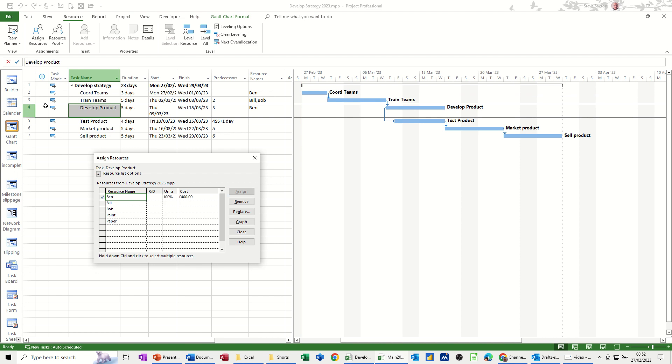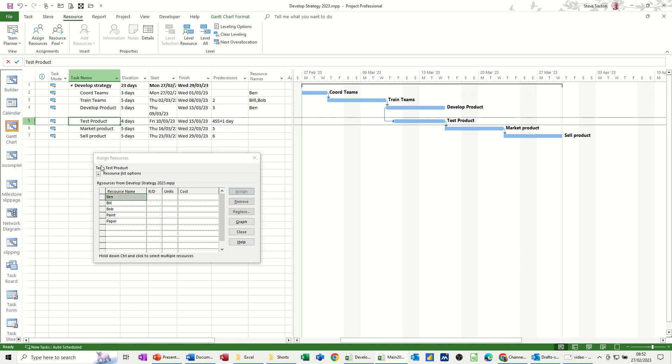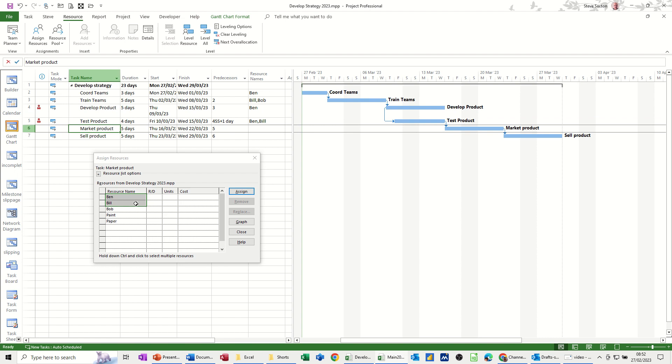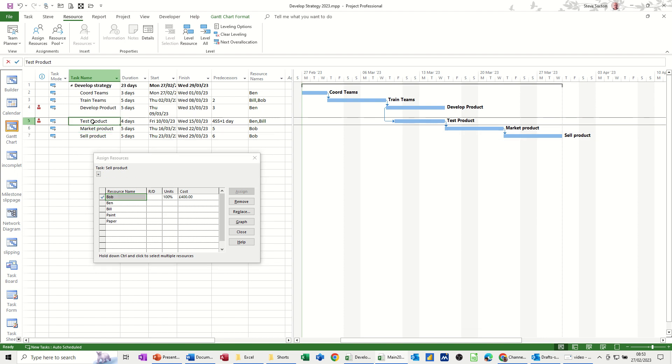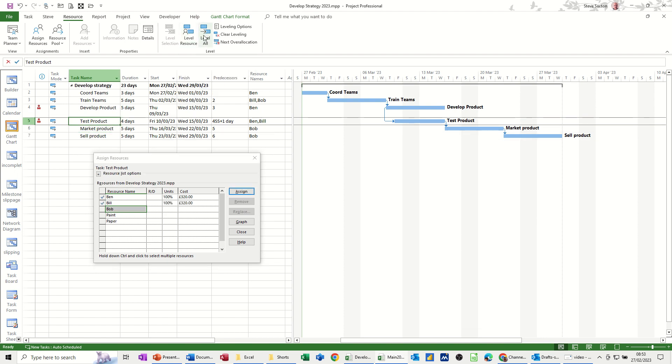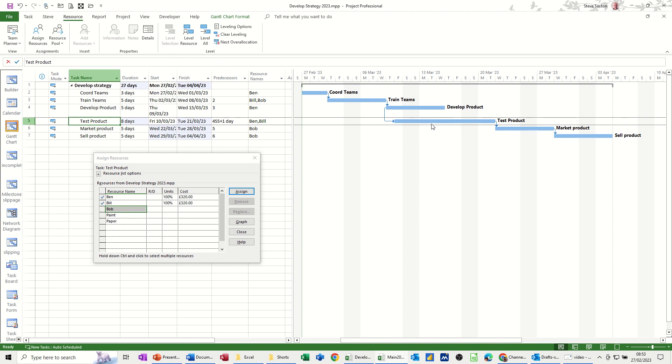Now, I'm watching out for any over allocated resources as I'm doing this. So test, I'll say Bill and Ben have to do that. Now I've got a problem. What I'll do is I'll fix that in a second. And market product can be Bob and sell product can also be Bob. So there's a bit of a clash here with these two. What I'm going to do is just level resources. In fact, I'll level all just to see where it shifts it to. So that's corrected it. I'm OK with that. It's sorted it out. I don't need to change any of this.